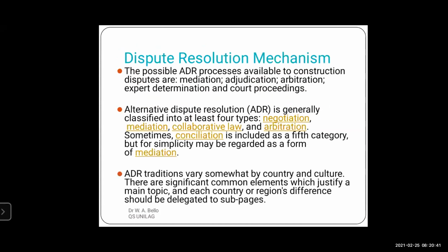So those dispute resolution mechanisms that are available to the construction industry will include mediation, adjudication, arbitration, expert determination, and of course, court proceedings. The court proceedings is a dispute resolution mechanism. And of course, we had said that it is adversarial. It is competing. It is when people are being assertive, they don't want to allow it. The concept of the zero mind will lead to that anyway.